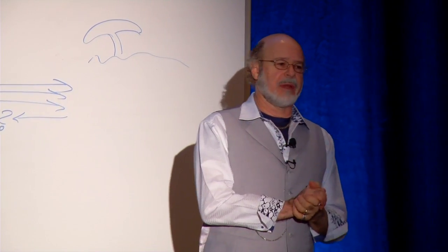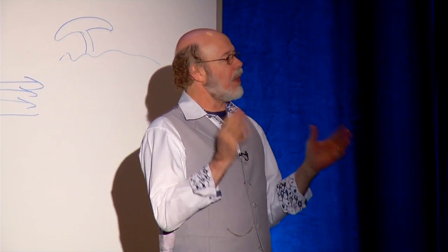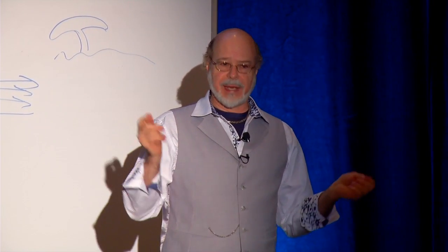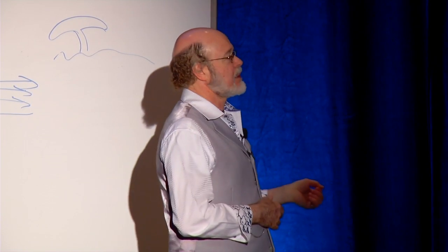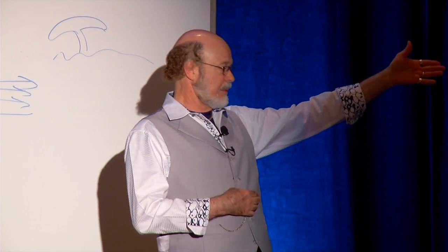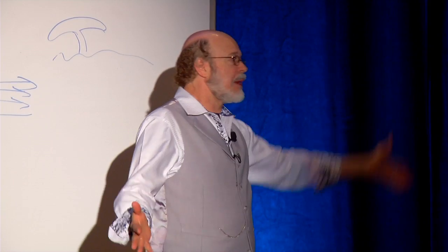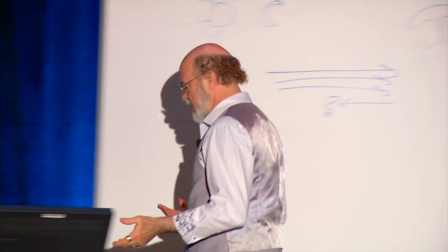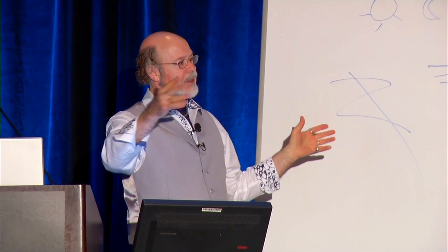And that's a very important part of any milestone, is letting people know what you can effectively do and when you need to have it to be able to effectively do it. There are some things that can come in at the very end, and I can probably get them in, and maybe not. So that's this milestone process, this process of setting the checklist up so that through the whole life of the project, you know what you need, when you need it, and they know what they need to give you. They meaning the sun, the moon, and the stars, because they know everything.